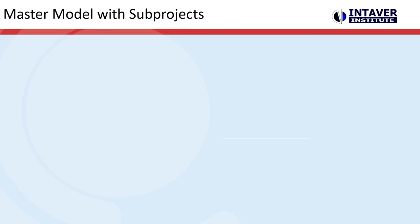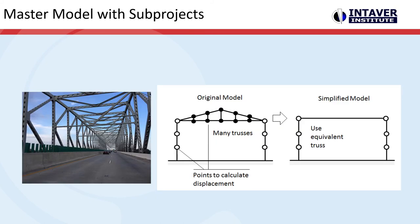Master model with subprojects: master and subprojects allows teams to run simulations on smaller, easier to maintain subprojects. The mathematical foundation for this is called static condensation, and this process analyzes smaller structures of larger objects first. As a result, by using the results of the subproject, we can use much smaller models for the analysis of a project.